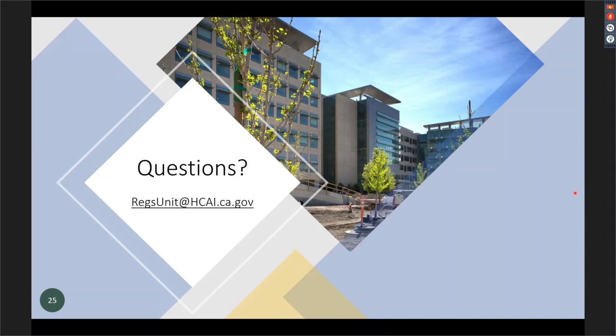This next question, Richard, I think it's a good question. It says, since the NMA criteria started, we have been converting all RFIs that are not obvious ACDs into NMAs. Can you give a few examples of RFIs that do not need to be brought to the field staff as an NMA? Yes, colors. What color is this wall? Or we're changing a color. Don't care.